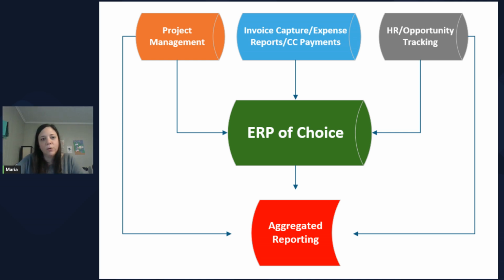What's nice about that is that once those invoices, let's say the invoices did come from TKE and they're for our project and not for the office, once the information's in our bookkeeping software, guess where it's going to go next? To our friend Procore. And so now our project teams can see that that TKE invoice has hit. They can see the balance compared to their contract and what's still left to pay, or if they're in a position where they need to start talking to somebody about a change order, right? And so that's why it's so important that we want to keep all of these lines moving and integrated and talking to each other. Now we can move on.